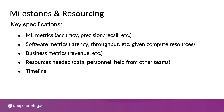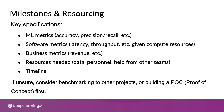Now, if you're looking at a machine learning project and you find that you're having a very hard time writing out some of these key specifications, then you might also consider carrying out a benchmarking exercise to compare it to other similar projects that others may have worked on before.